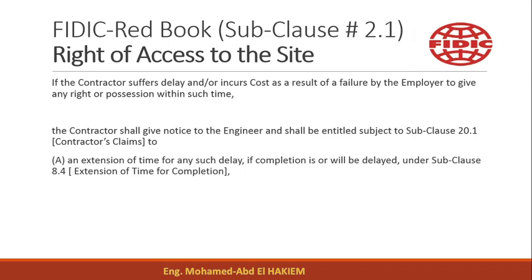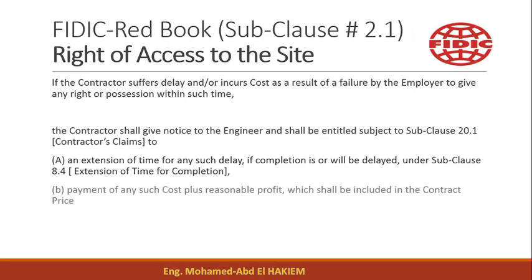A. An extension of time for any such delay, if completion is or will be delayed, under subclause 8.4 – Extension of Time for Completion; and B. Payment of any such cost plus reasonable profit, which shall be included in the contract price.